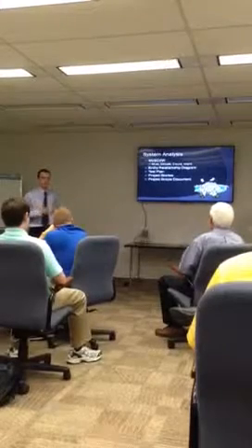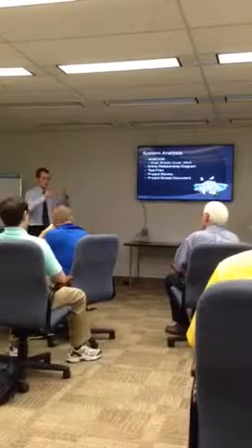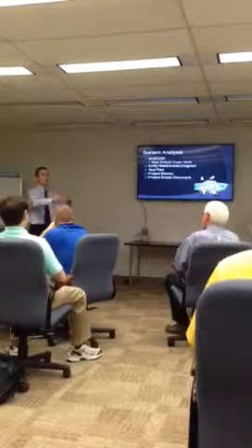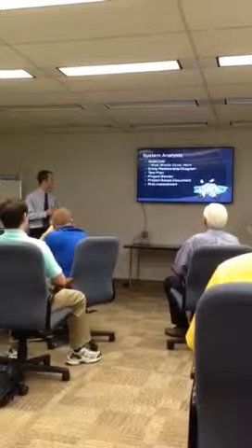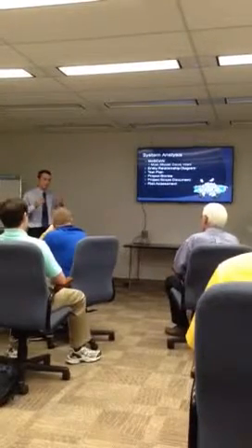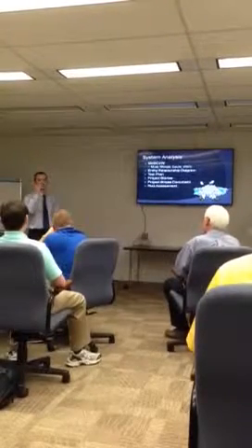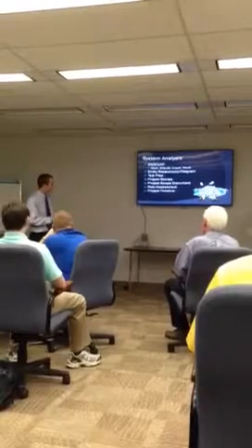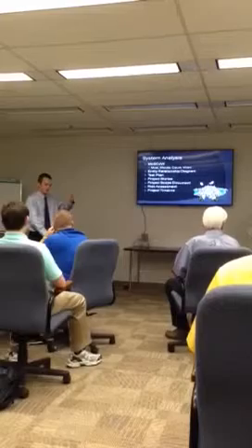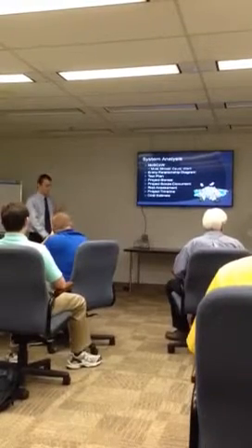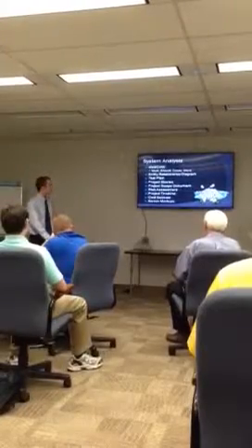Project scope, this is kind of the contract, if you will, with the user to say, okay, this is what we will do and we won't go beyond these lines for this project. And risk assessment. We looked up the risk for if there was any legal risks, security risks, personnel risks, etc. Project timeline to figure out how long the project was going to take, as well as a cost estimate. And then developing screen mockups.